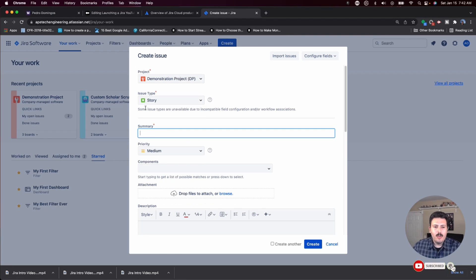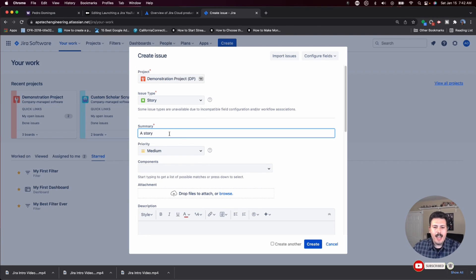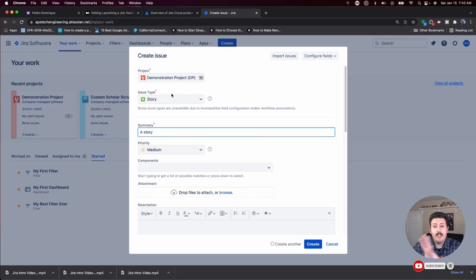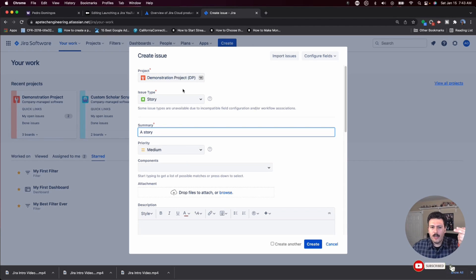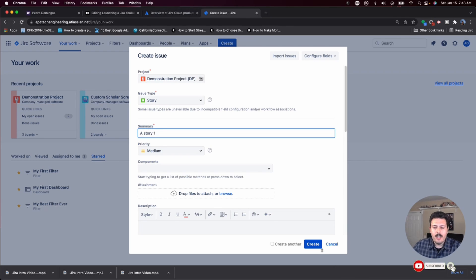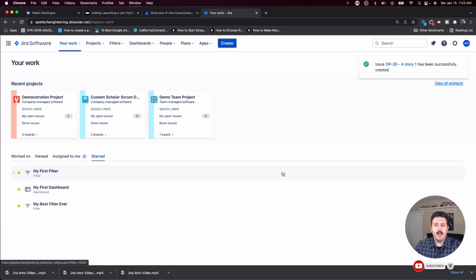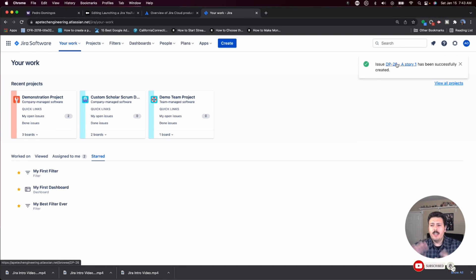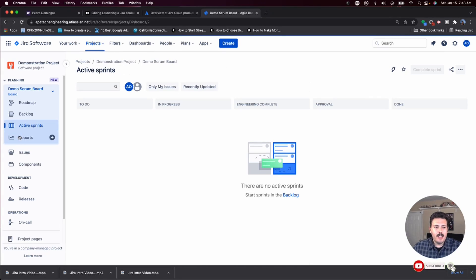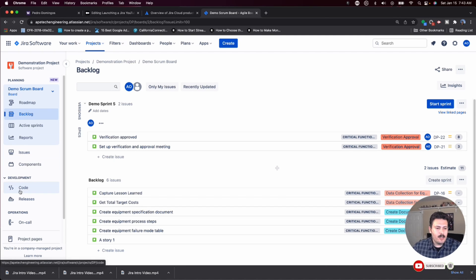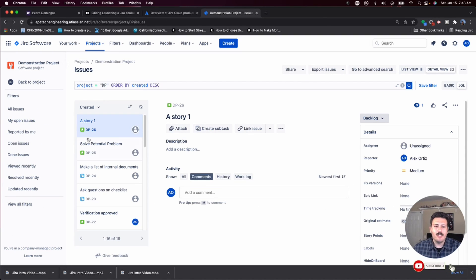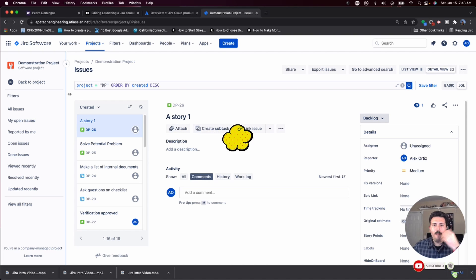Once you pick your issue type, I'm going to pick story. You're going to give it a name, a story, and then any other required fields as indicated by this little red asterisk are going to have to be filled out by default. If you're in the screen, you're going to have to pick the project, the issue type, and then the title. I'm just going to add a one because I'm going to create four of these. If nothing else is required, you can just hit the create button and that issue is now created. It'll give you a little pop-up on the screen telling you that the issue has been created. You can either, if you're quick, click on it. Otherwise, you're going to want to go into the actual project itself. Then it's going to be in either the backlog or in issues depending on your configurations or settings. As you can see, here's my issue.